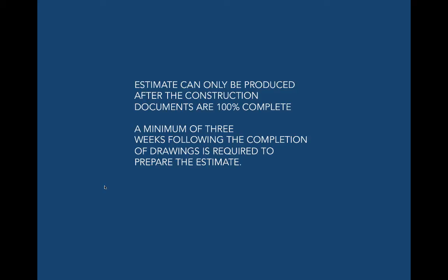They'll measure the materials that they're going to have to buy and install. They're going to put hours into the work that they're going to put together, and they'll put their profit markup on that, and that's their cost. And that's the way we ask for our last cost to be done. So that if there's a discrepancy between our cost and the low bid cost, we can compare apples to apples.